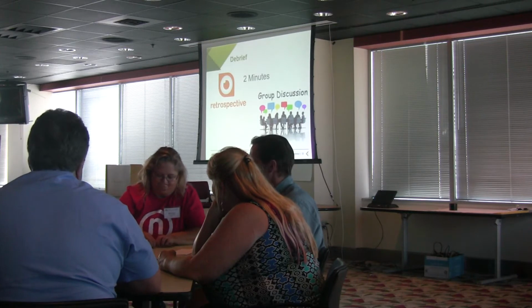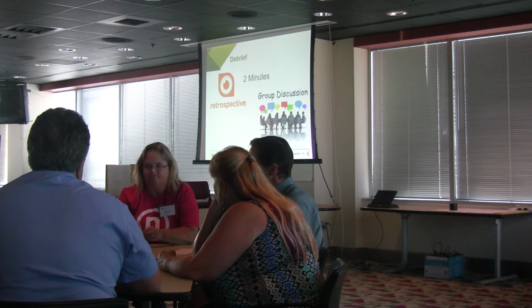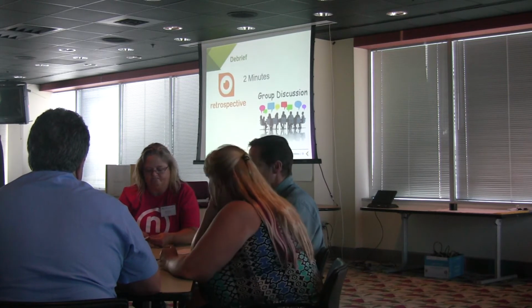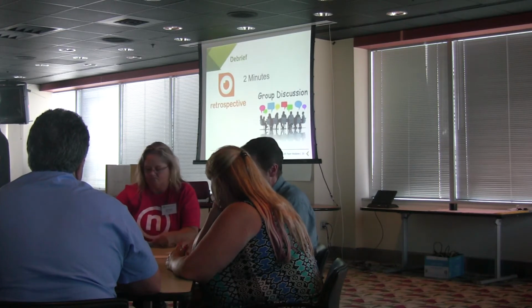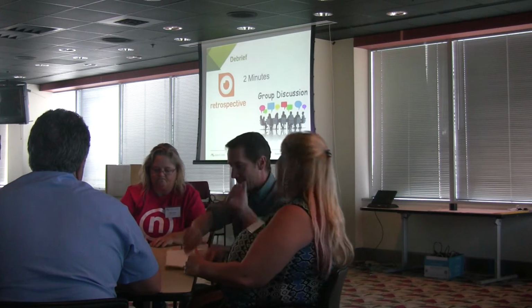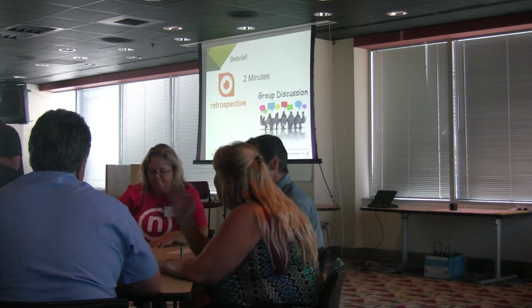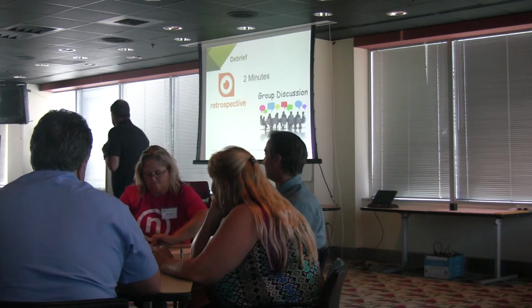Probably the biggest thing that we noticed was, at first, we're like, how long does it take to make one? Okay, so let's just make sure we're building it at that rate, but then you have the idle time. If you just say, once someone's available, give them work, you'll be more efficient. That's why we said, now spread out the tasks evenly, so everybody's busy once the line gets through the first 20.